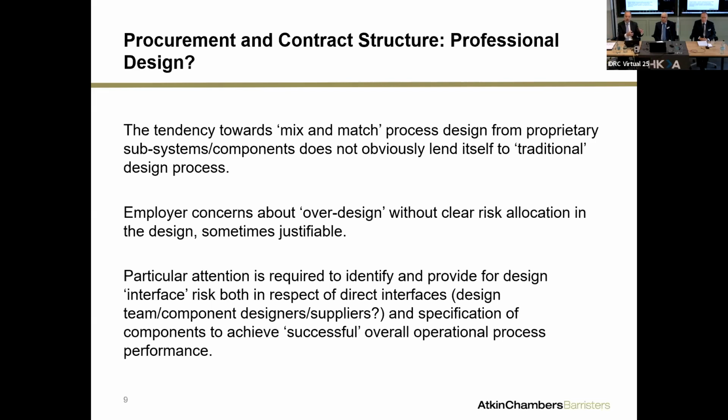Take the fuel crane example. So you take your consultant at Ramboll. You say, right, what you want to do is find one of X number of cranes on the market, there are VMAG, Kona, whoever, Stana. This is the specification we've got. What you need to do is tender out to each of these suppliers what you want from the fuel crane, and you get the tenders back and you choose with advice.